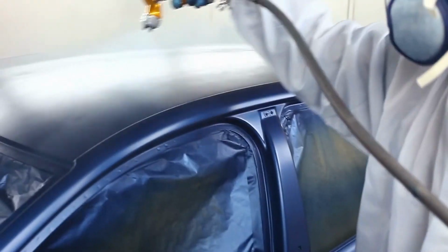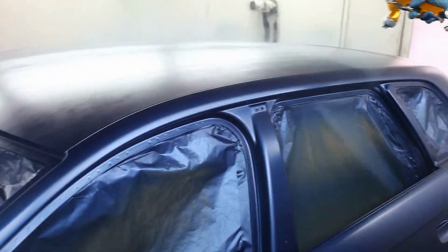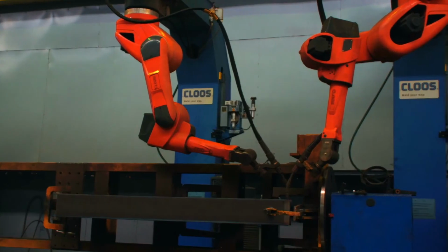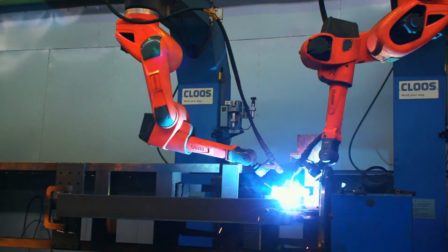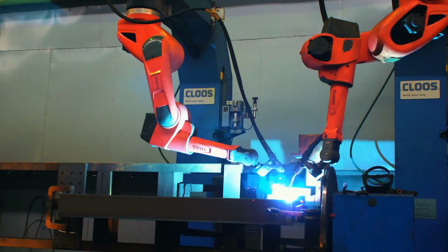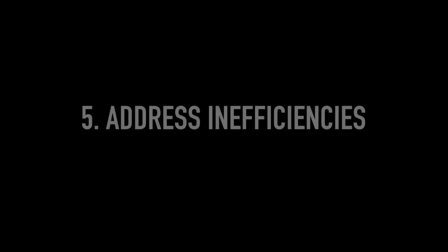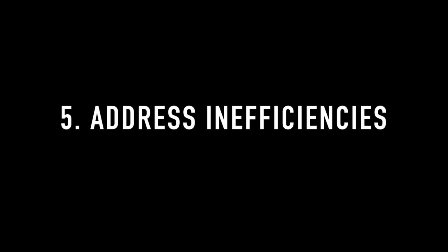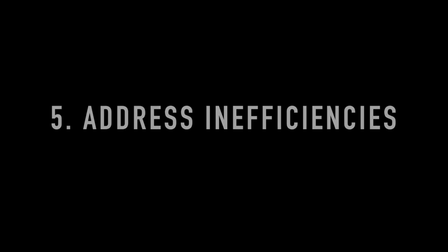In contrast, it'd be impossible to overlap tasks like installing body panels and lights while the car is getting painted. They're too closely related with too much happening at once. Only certain tasks can be overlapped, but doing so is a valuable way to speed up a project. As the old saying goes, the easiest way to save money is to not spend it. The same can be said for a project's budget and for the project's timeline.